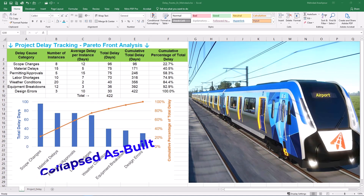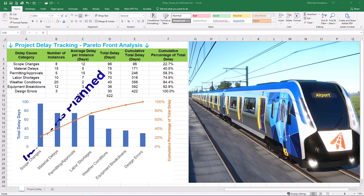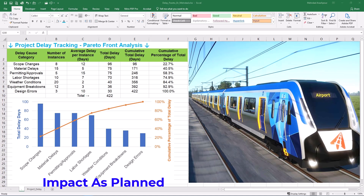Next up is collapse as-built, which is a retrospective method. You start with the as-built schedule — a record of what actually happened — then hypothetically remove all the contractor-responsible delays. The difference between this collapsed schedule and the original as-planned schedule theoretically represents the owner-caused delays. It's strong for isolating delay responsibility, but reconstructing the collapsed schedule can be challenging and open to interpretation, especially if records are incomplete. Impact as-planned calculates delay by assuming each delay event occurred exactly as initially planned. It's often criticized for being too theoretical and not accurately reflecting the dynamic reality of project execution where delays rarely happen in isolation.